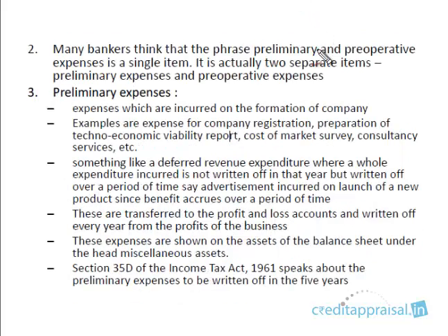Many bankers think that preliminary preoperative expenses is a single term, but they are two separate terms. Preliminary expenses are different and preoperative expenses are different. Preliminary expenses are expenses incurred upon the formation of the company, like company registration fees, TEV report preparation, market survey, and some consultancy services. All these are incurred on the formation of the company.